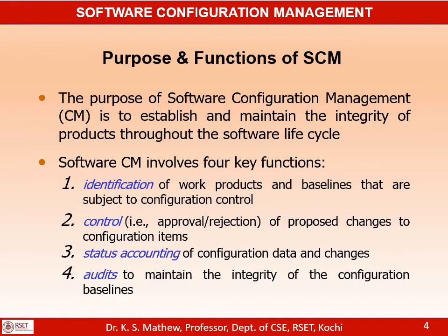Then status accounting of configuration data and changes. So we need to also have a mechanism for accounting or maintaining the details of these changes of various work products. Status accounting. What is the current version of each work product? When was that work product last changed? What was the reason for the change? Who approved the change?